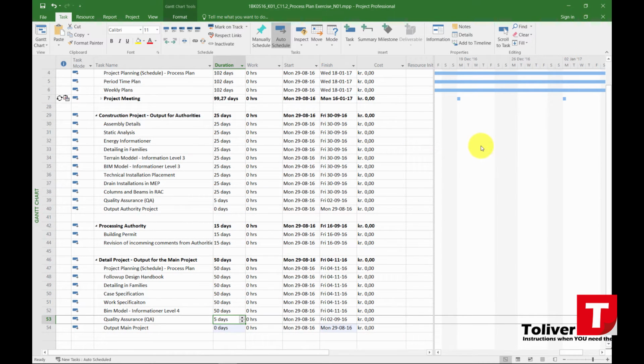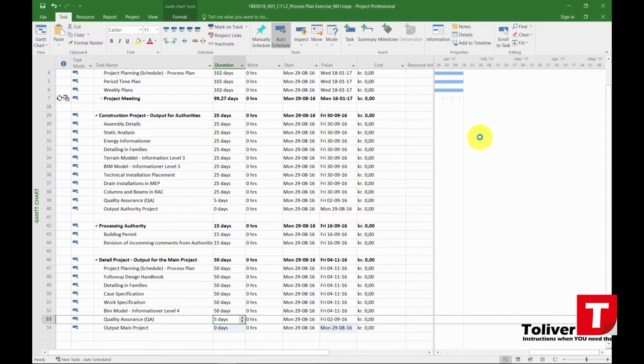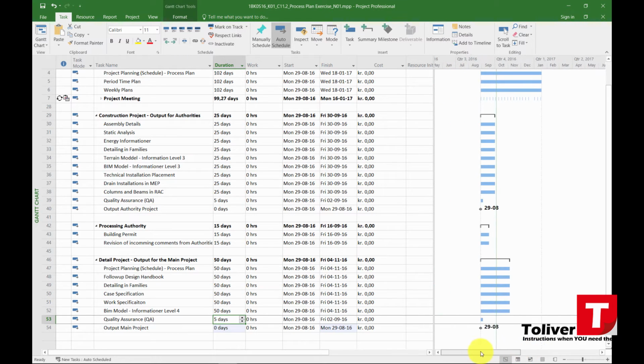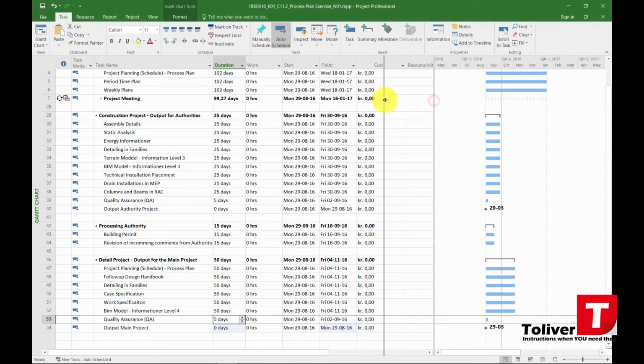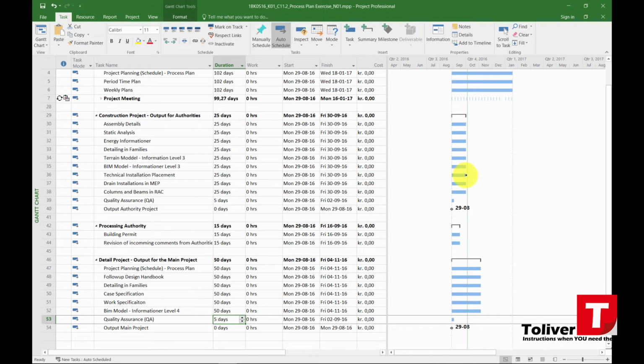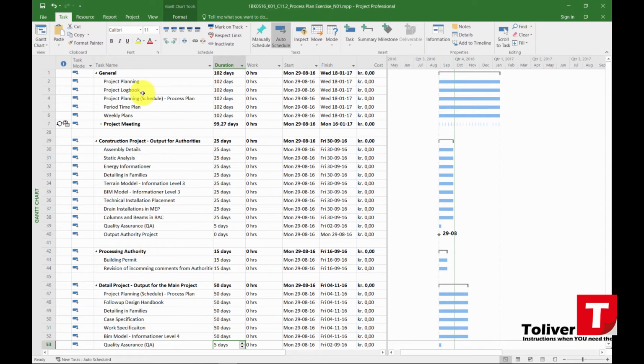This is the different durations of the activities that I'm going to be using. Now, I'm going to click out here, hold down Control, and then use the middle mouse button, the scroll button, and scroll out so I can see my activities. Now I need to connect these, and the way I connect them is what I could do, I could press this one, hold down the Control button, use the left mouse button and click on that one.